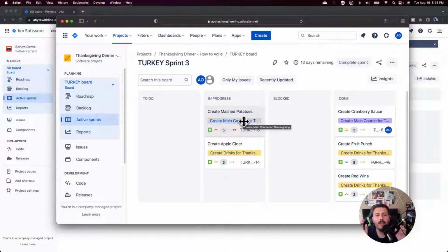Now, if your team member all of a sudden says, hey, we were blocked on everything, and so we want to bring other stuff in from the backlog, that is acceptable if you've actually hit a wall, right? If there is no more progress you can make for the next couple of days, maybe the person in charge of the budget is on vacation for the next 2 days and you can't get an approval, then as long as you appropriately block things and have a plan, you're allowed to go back into your backlog.